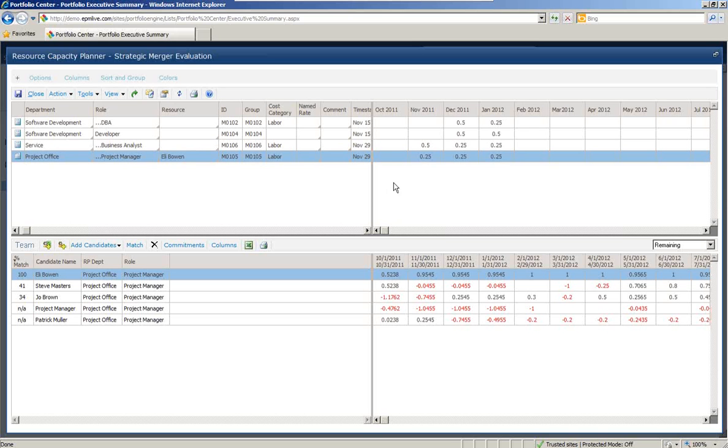What's nice about this is that we can really use this in either a more standalone planning mode or enable what we call a negotiation mode, so that your project management, let's just say PMO type of function, and your functional or resource management groups can go through a negotiation process where the ask is more generic and the functional manager may respond with the who and the resource that's specifically needed or available to do the work on a specific project.